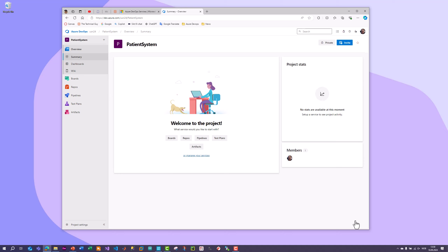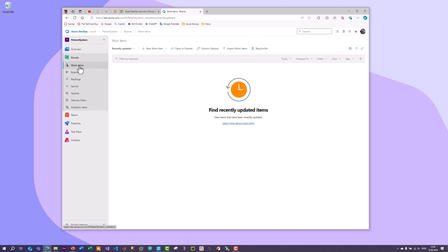Azure DevOps is basically a tool for software engineering. We can use it for planning, collaboration, source code control, Agile and Scrum project planning. In this tutorial we use it for work tracking and work monitoring. To get started, go to Boards and click Work Items. Under the plus sign for new work item, you have different types available - in Scrum we typically use product backlog item, task, and feature.